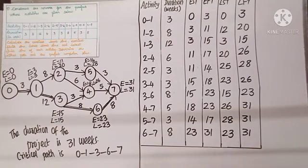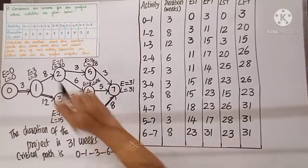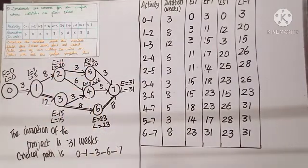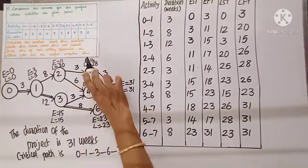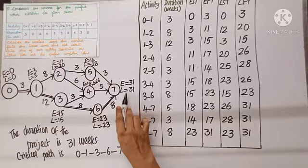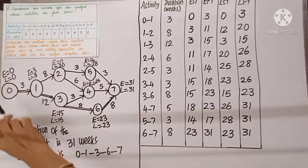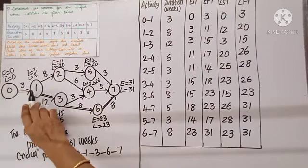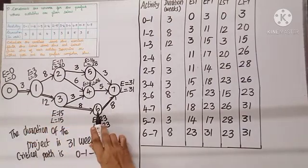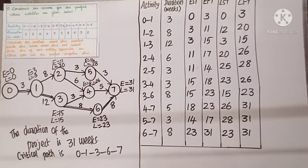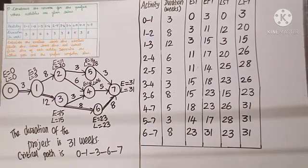The table is now complete as required by the question. The project completion time is thirty-one weeks. The critical path is zero-one, one-three, three-six, six-seven. That completes the entire answer.